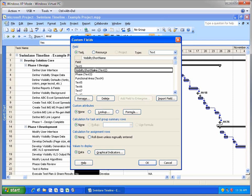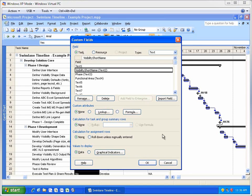In addition, there's a special custom text field in this project that the Swimlane Timeline looks for to display task nicknames called Visibility Short Name, in this case Text 2.